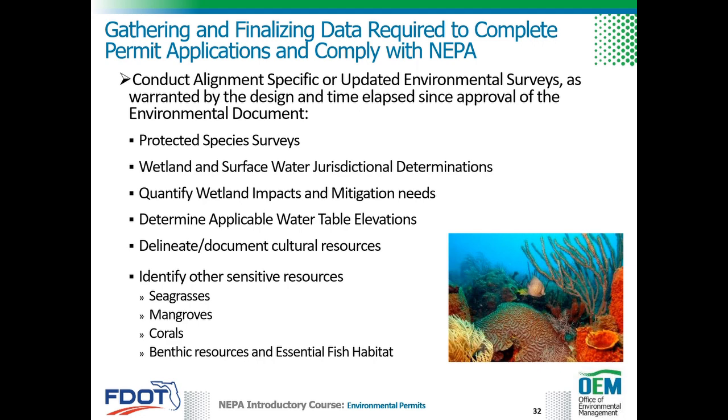This may involve conducting protected species surveys, wetland and surface water jurisdictional determinations, wetland impacts, and mitigation need assessments. Applicable water table elevation determinations, cultural resources delineations or documentation, as well as identification of other sensitive resources such as seagrasses, mangroves, corals, benthic resources, and essential fish habitat.